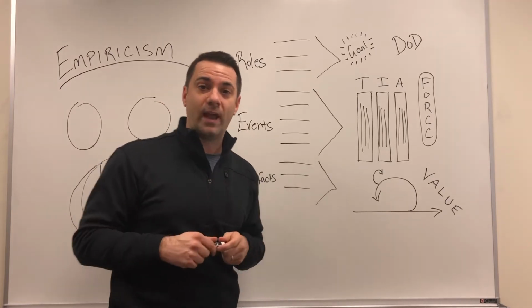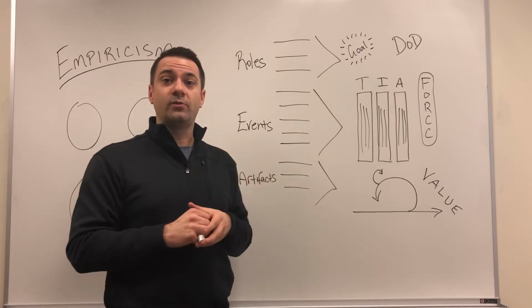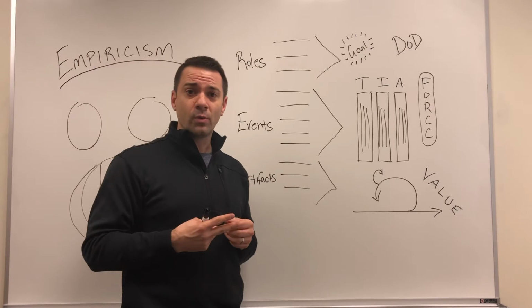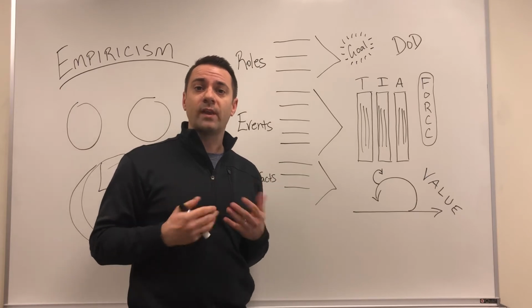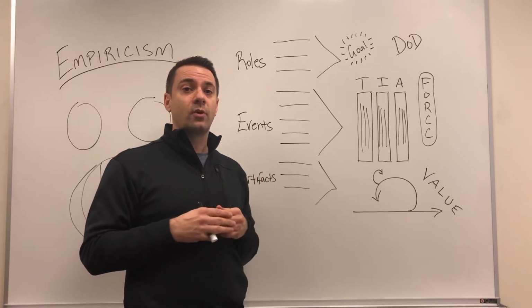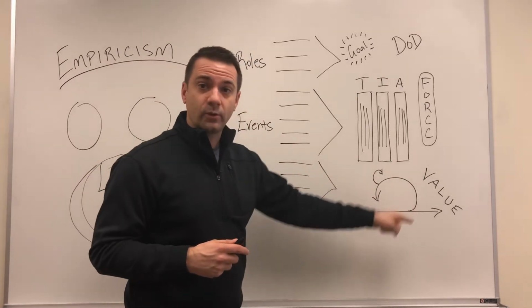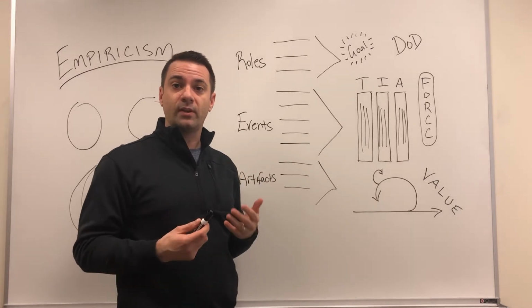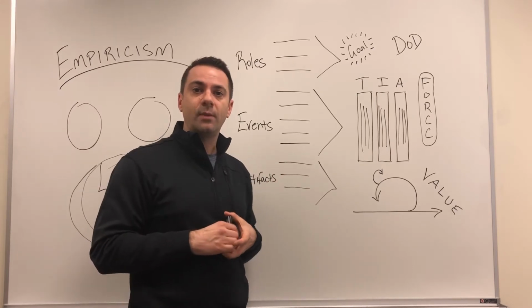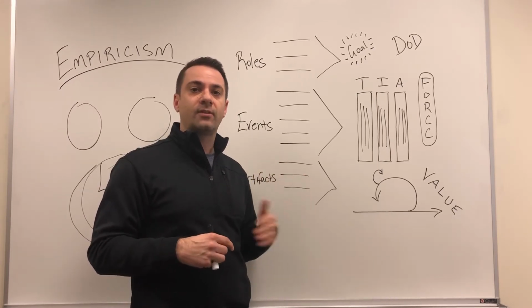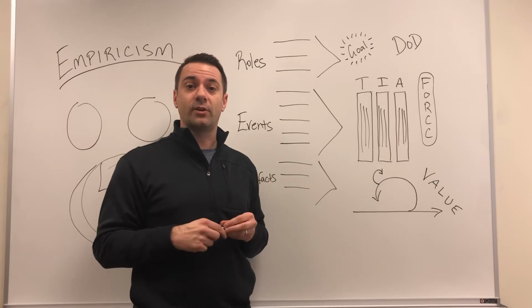And 2 amazing things happened. 1, they identified very clear skill gaps that they could then go and find a new team member to bring to the team. And 2, they decided, let's use this as an opportunity to teach each other some things that we didn't know. They weren't doing that before. The transparency of their skills were not visible for everyone to see and understand. So again, it was that feedback loop, and we decided to do something using transparency. They inspected what they had and they adapted. And sure enough, they found a new person to join the team, filled those gaps, and every week since, they have had a learning moment, 30 minutes, 60 minutes, but they dedicate that time to teach each other those skill gaps.